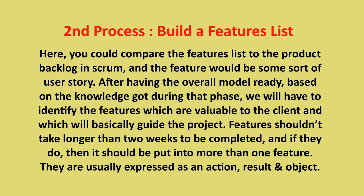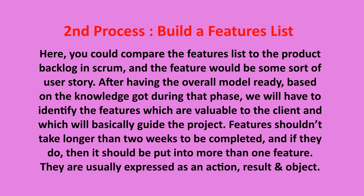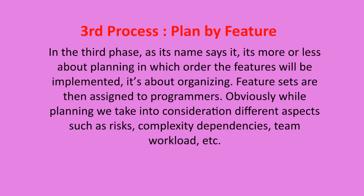The second process is build the feature list. You could compare the feature list to the product backlog in Scrum, and the feature would be some sort of user story. After having the overall model ready, we identify the features which are valuable to the client and which will guide the project. Features shouldn't take longer than two weeks to be completed; if they do, they should be broken into more than one feature. They are usually expressed as an action, result, and object.